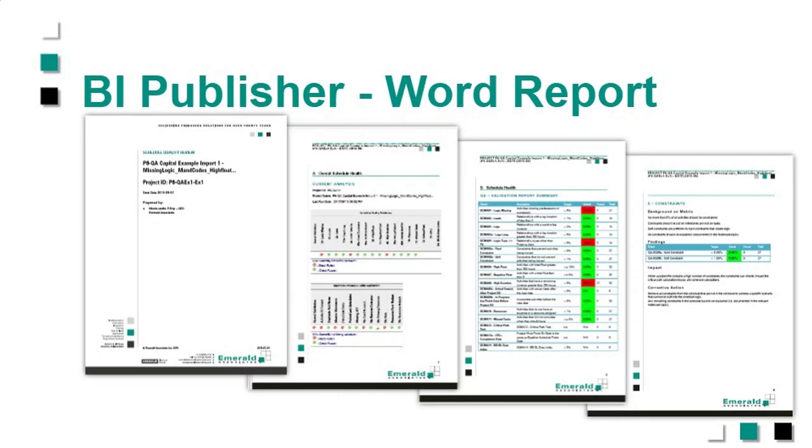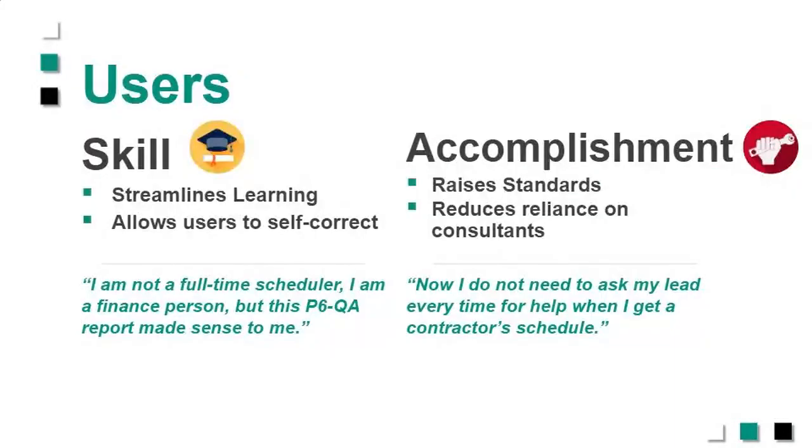So hopefully you saw some interesting potential benefits, and we've got lots of clients that have given feedback on it. As we mentioned, very easy to use, so even for folks who are not full-time schedulers, they can understand the outputs. One of my clients that I used this tool with was a big developer in New York City doing a huge $600 million tower. My direct client was the CFO, who didn't know anything about scheduling and did not have a scheduler on the team. So our job was to help them deploy P6 and critique the schedules coming from the contractor. We were able to critique an 8,000 activity schedule in less than 2 hours, enough to give him enough meat to go back to the contractor and point out some very glaring problems with the schedule.